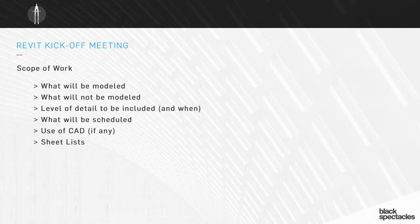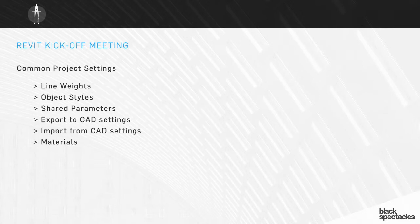Also in terms of scope of work, you need to understand if there is CAD being used on this project, what it's being used for and in what circumstances. And you need to know what the sheet list for the project is — what sheets are going to be produced, how many floor plans, what elevations, what wall sections. You should have a mock-up of what the set is going to be, and that typically comes out of the kickoff meeting discussion.